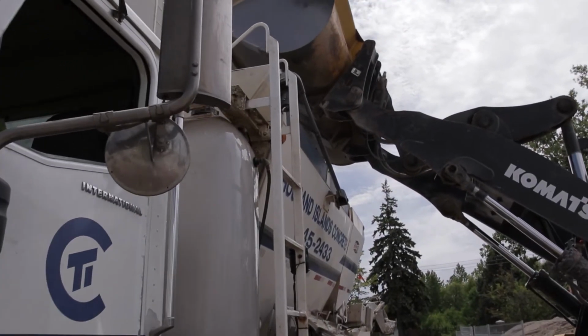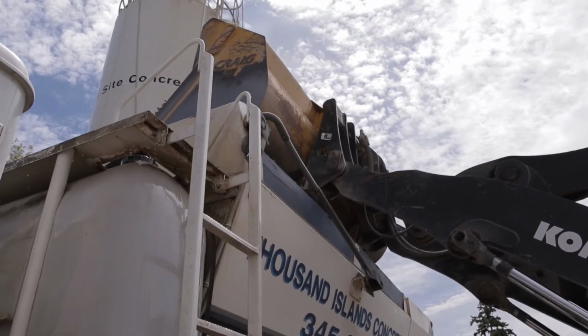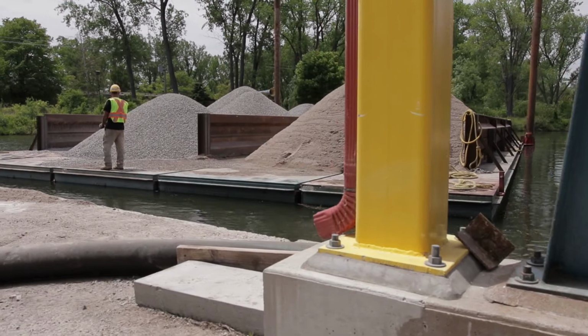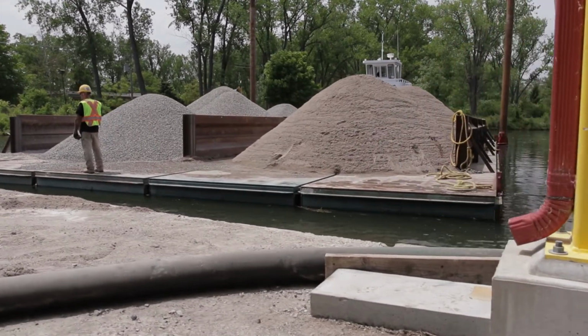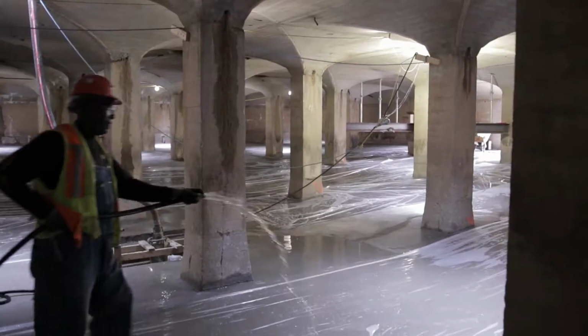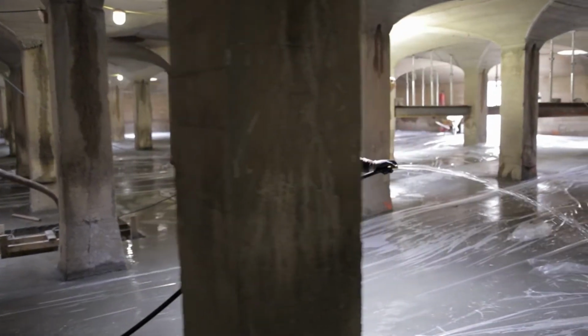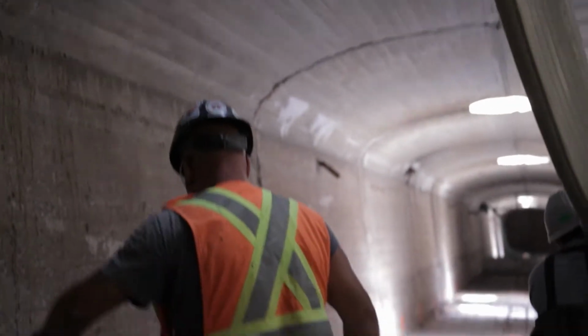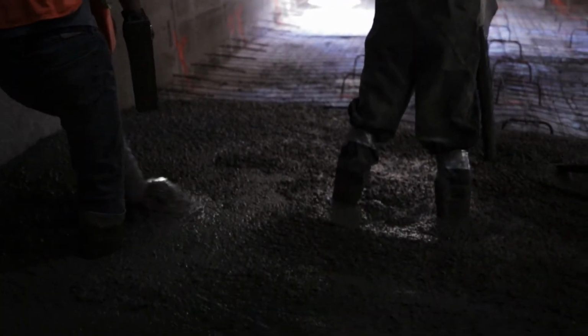On a daily basis, the aggregates are filled up on the mainland. We have 2 barges that are shipped over every day. And then towards the evening, we go back to the mainland, fill up and do the same process for the next day. 300 meters a day was an optimistic goal for Alberici, and I think they're pleasantly surprised that we're able to achieve that.